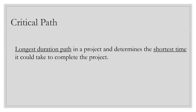First, it says the longest duration path in a project. If you have three activities in one line from start to end, each taking 10 days, that's 30 days to go through that path. If you have another stream — A, B, C, D — each taking 10 days, that's 40 days. You choose the path with the longest duration, which is the 40-day path. That is one part of the definition: the longest duration path is the critical path.